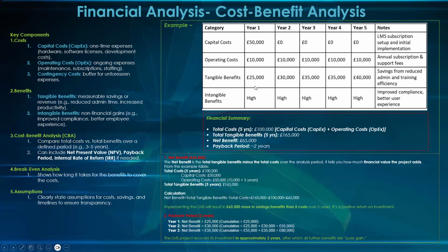Understood. So you find out that if you add the benefits in year one, you are not making up to what you have here. Yeah. If you now add the benefits in year two, you could see that you've already passed that 50,000 that you used for your initial deposit. So at this point, you start making profits because you've already passed this. You started making profits. Yeah.